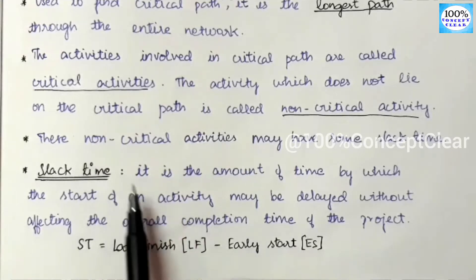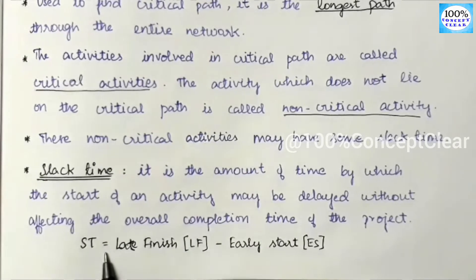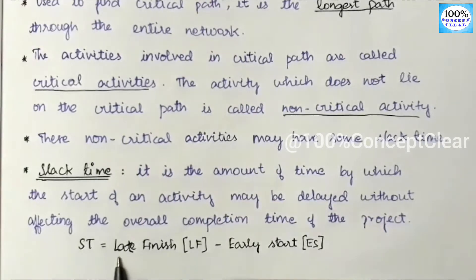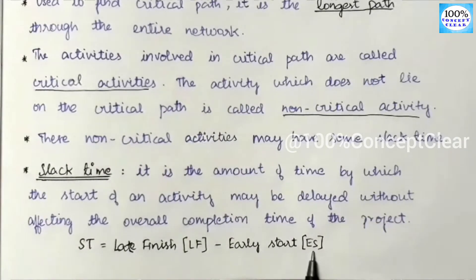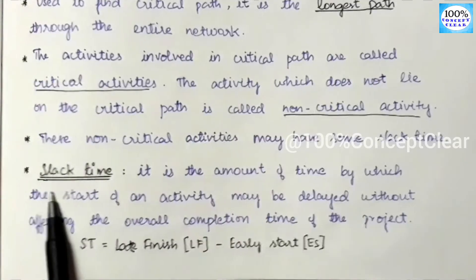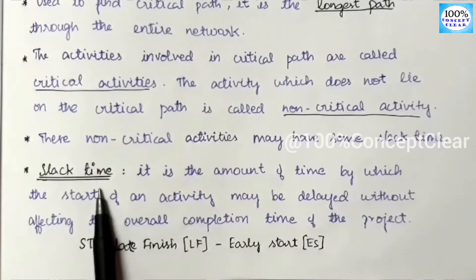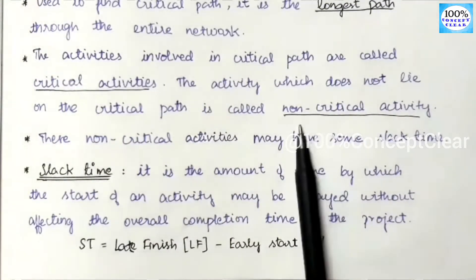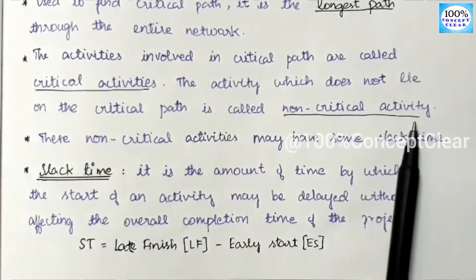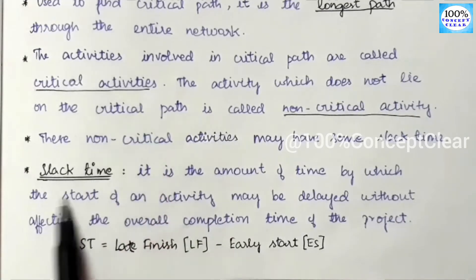So, if we start an activity late and delay it, the overall completion time of the project should not be affected. We define slack time as: Late Finish minus Early Start (LF - ES = slack time). There is slack time for non-critical activities.